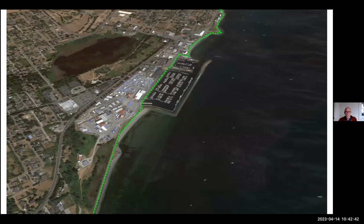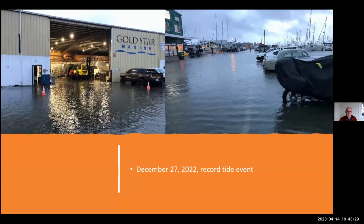So we are investing millions of dollars in the boatyard, and it's pretty easy to see that if we flood on a seasonal tidal basis, that's problematic. So we've begun the process of studying a flood protection project, and I'll tell you a little bit more about it, but phase 1 is drawn in green here. It would attempt to tie the high point at Larry Scott Trail to a high point somewhere along Sims Way and the bluffs before the ferry landing. So it'd be an independently viable phase that would probably provide a model for how downtown Port Townsend could be protected in future phase projects.